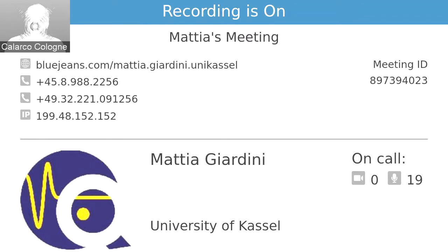Here's what I want to do, and here's how I do it, and how I organize myself in order to do it. So from the overarching goal come the objectives, and then different tasks, and then they are connected to each other in an implementation plan which says how they feed into each other, and when they give rise to deliverables, when are milestones which are control points in which the different tasks are maybe connected to see how to proceed, and in the end, also the aspect of how to manage, how to organize, how many resources, where does the money go to, has to appear just as a consequence,